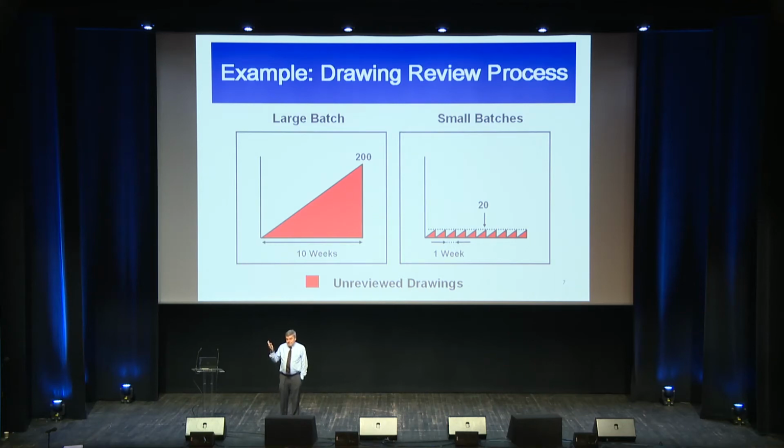No evidence of that. Everyone I talk to in software, 15-minute daily stand-ups, so it costs you almost 2 hours per week, maybe, depending how many days you work and things like that. The weekly team meetings were invariably up in the range of 4 hours or more. We were never getting 2 hours of meetings when we did weekly team meetings. So that's a bit of an illusion.